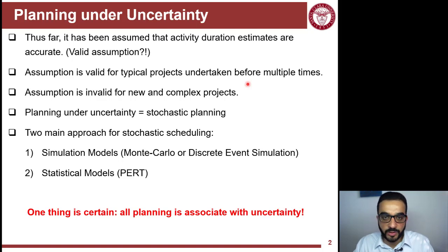The first one is simulations. So you can use a computer to do many trials and many simulation iterations or trials of the project. Every simulation trial, you change the values of your durations or cost estimate, or here we're talking scheduling, so you change the duration of different activities. You do CPM calculations, you get a different number for project duration, and then this will be the sample. All these trials will be the sample, and you can do statistical analysis and probabilistic modeling to that.